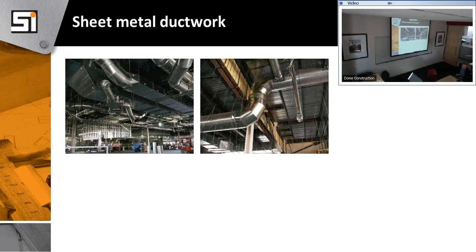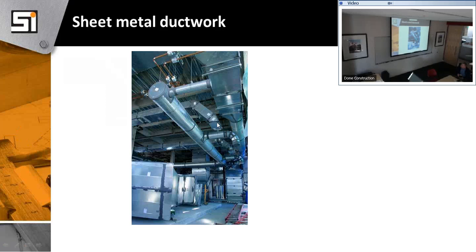Cost. We have machines, so actually, we're a good team here. I have better pictures. You see all these little ribs here? We call this spiral. We have a machine that just spirals this thing out. It keeps going, but typically we do 10-foot lengths, and if we have an opportunity to go longer, we will. So it's almost no manpower involved, not a lot of handling. The machine just spirals it out and we bring it out.